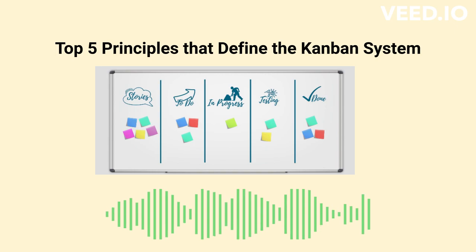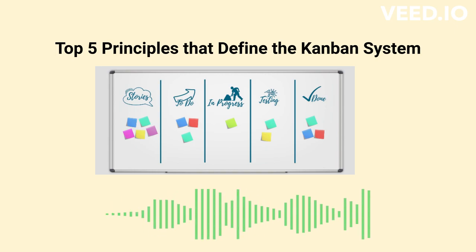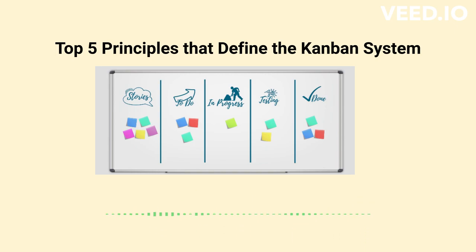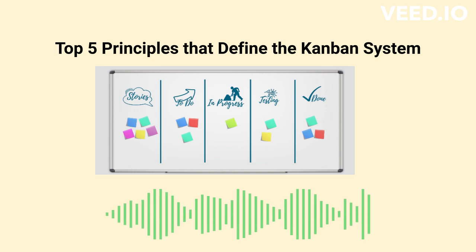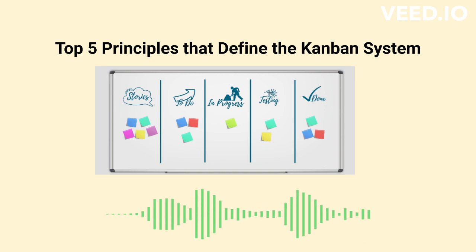Minimizing WIP, work in process, plays a key role in achieving efficiency. The effective system starts with a limited amount of work and determines the achievable WIP limit. As per the Kanban slogan, new work cannot be started until the previous work is finished. According to the simple ideology, one completely finished, 100% task adds more value than 10 pieces of work that are only partially completed.